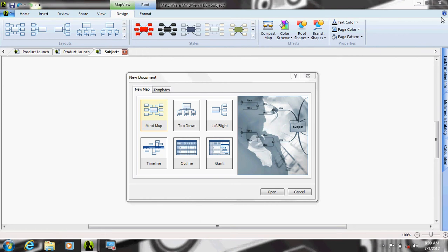And also, before I jump into this demo, I noticed a lot of your requirements revolve around the Gantt chart capabilities. A lot of people find the Gantt chart intimidating, especially if you're not in a true project management role, because of such a linear look to it. PMI, which is the governing body of project management, suggests that prior to the Gantt chart, you should probably use a WBS or mind map to visualize the plan and help construct the Gantt chart. This makes the Gantt chart a heck of a lot easier to use, and I know usability is one of your requirements.